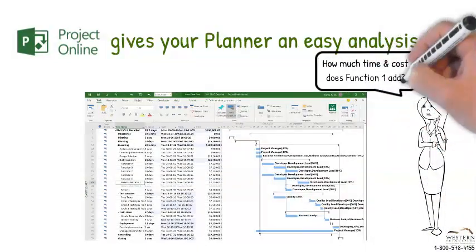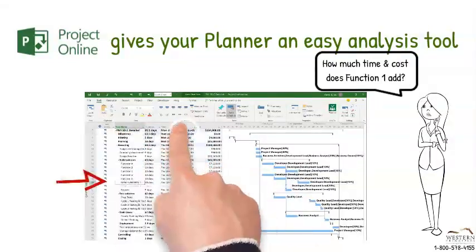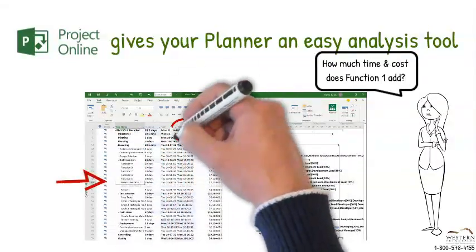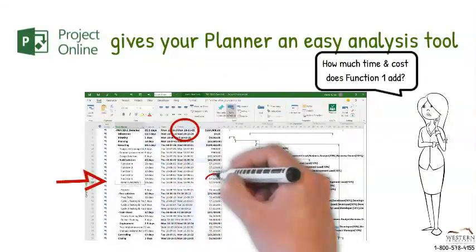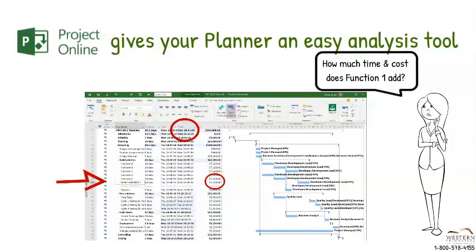Turn an activity on and the impact is automatically shown in the project duration, work, dates, and cost. You can quickly see if the activity pushes out your overall project time.